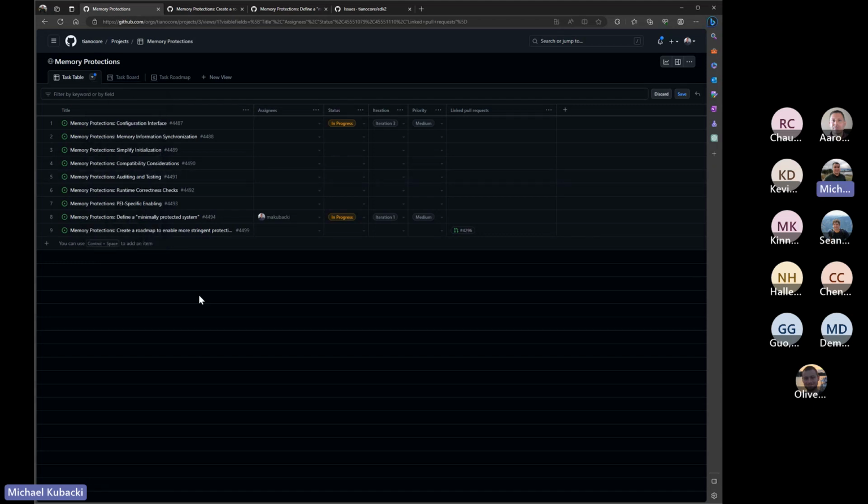One of the other things I'll mention real quick, because it might be a little confusing, is that the task lists organize things hierarchically, like I said. If you want to see if something is being tracked by another higher level task, there's a column that can be added called tracked by, and this will tell you if a work item is part of another task list.